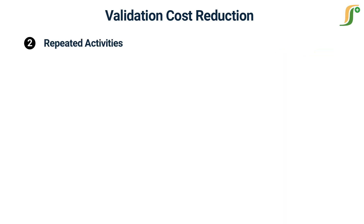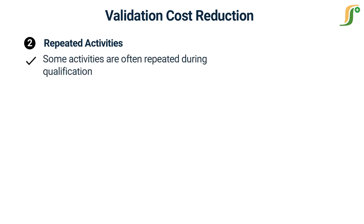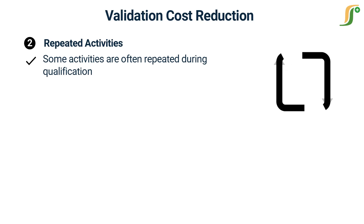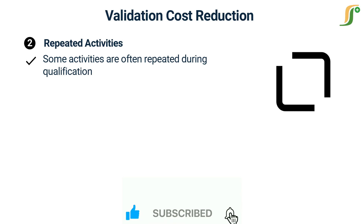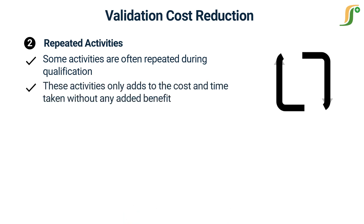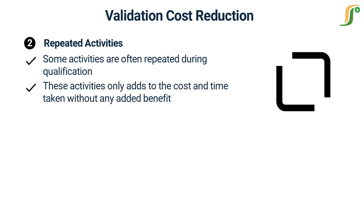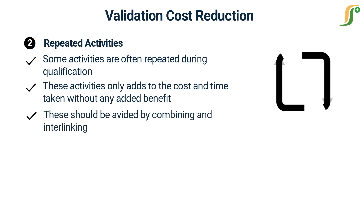The second factor is repeated activities. Certain activities are often repeated during qualification; such duplication occurs during commissioning to ensure safety and quality, but in reality it only adds to cost and time without any added benefit. Procedures that are repetitive in nature can be carefully analyzed and avoided by combining interlinked processes and ensuring a proper communication channel between the concerned authorities.